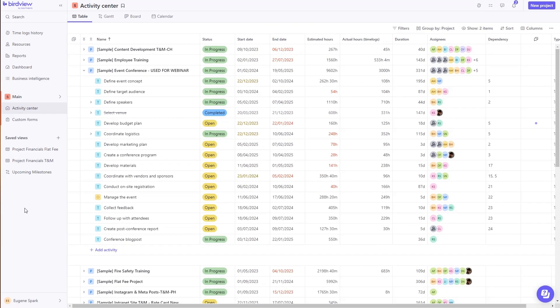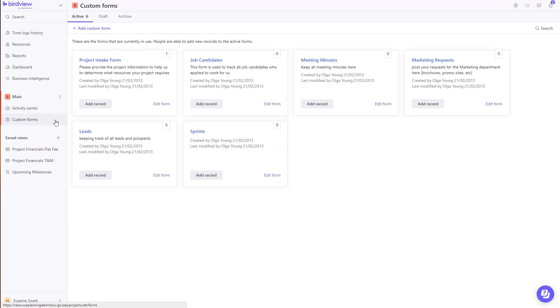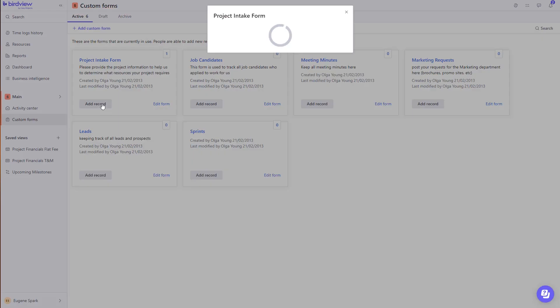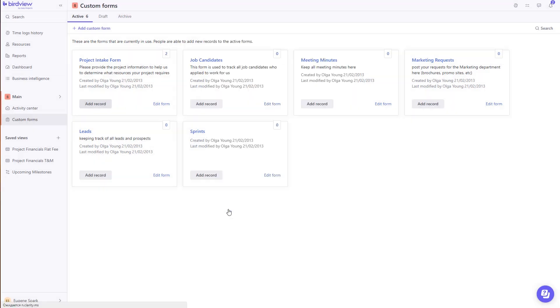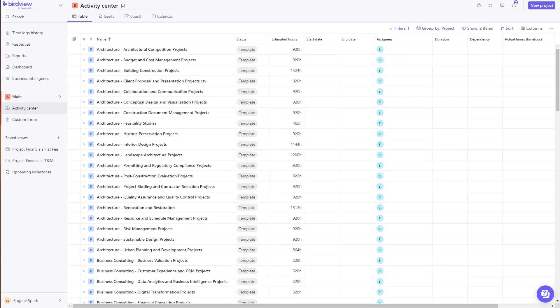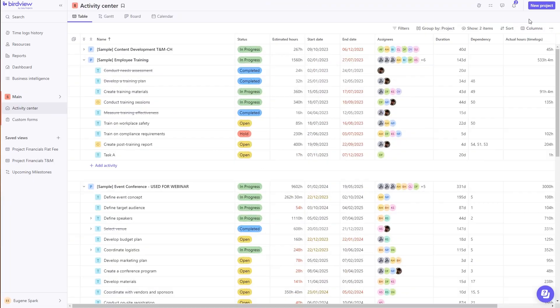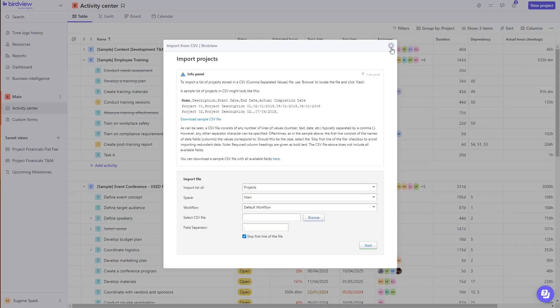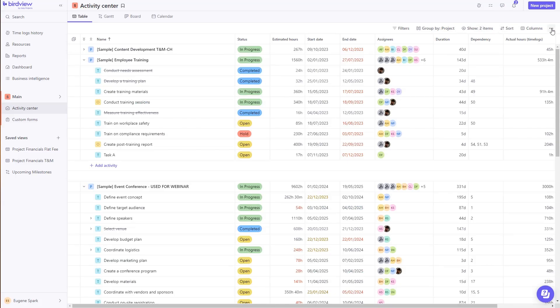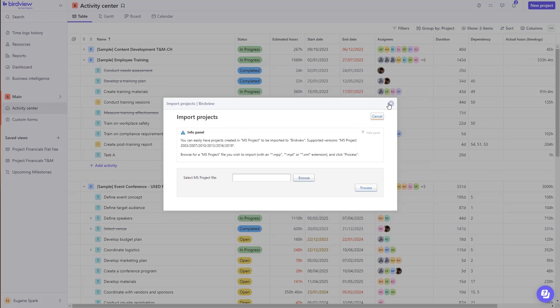Project creation in BirdView has never been easier. We now offer you several different options to create your projects, from project intake via robust custom forms, to templates, and even support the importation of tasks from a CSV file or MS projects.